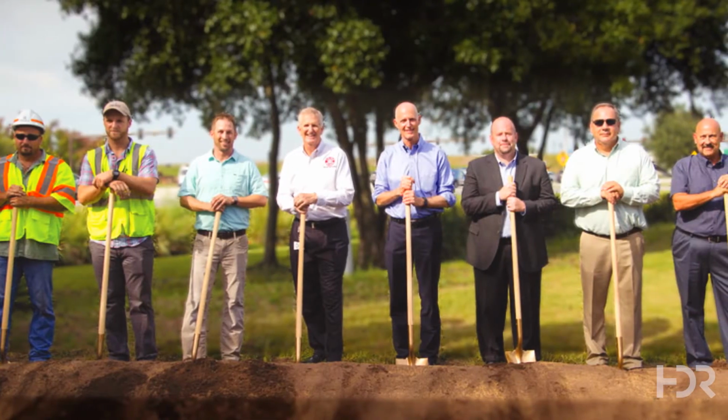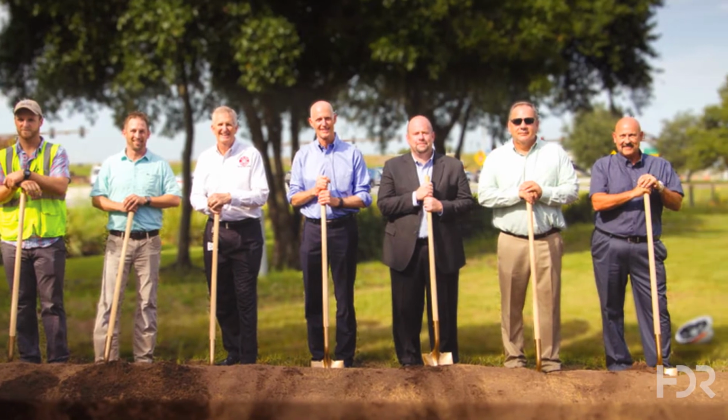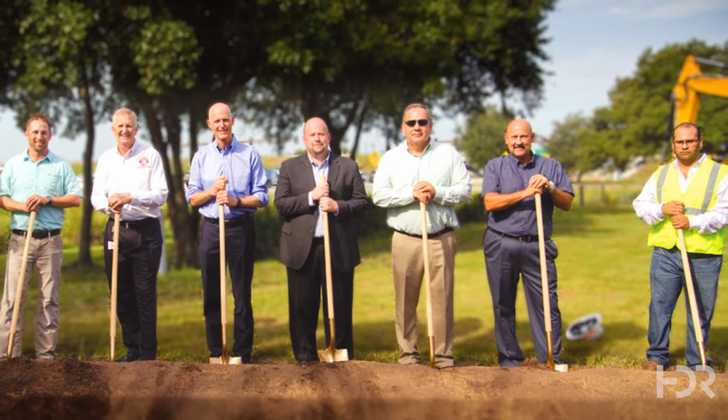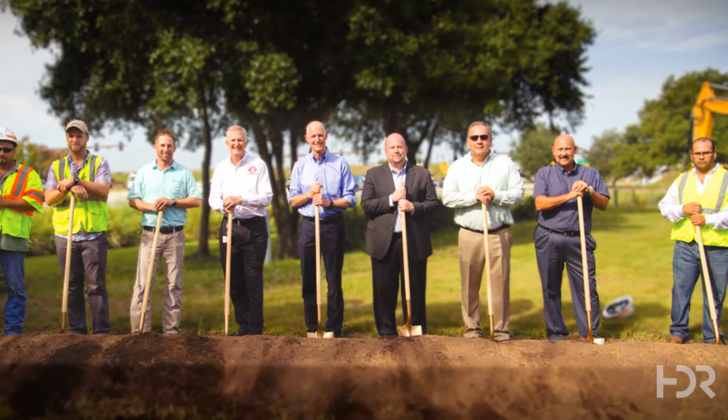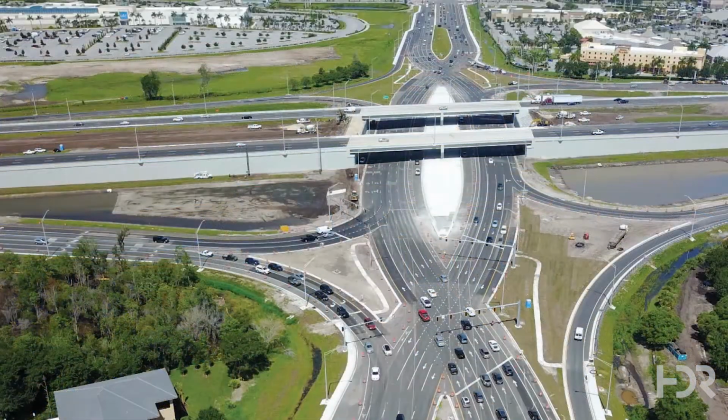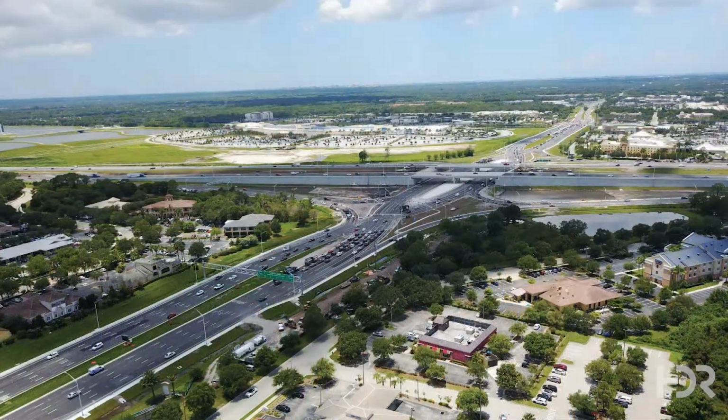The groundbreaking ceremony was held on September 2, 2015 to meet an aggressive 2-year construction schedule in advance of the International Rowing event held the week of September 3, 2017. The Interstate 75 University Parkway interchange offers 6 lanes in each direction through the core of the interchange. Traffic was open to the public on May 21, 2017. This was just 5 years and 1 month from the start of design. This truly speaks to the partnerships and teamwork that went into the initially unfunded project.